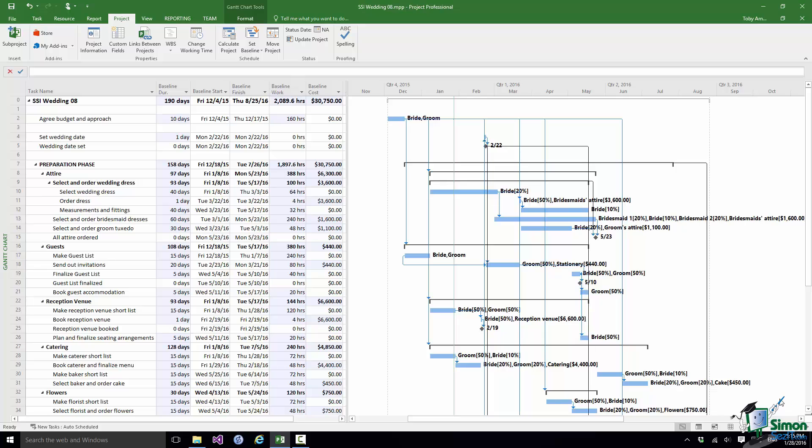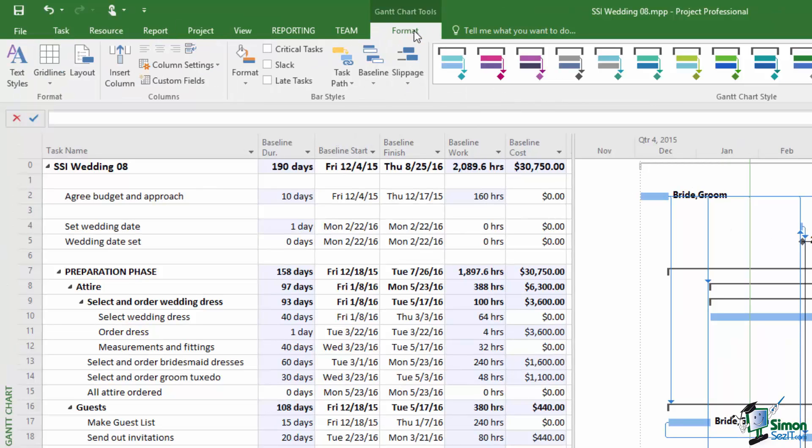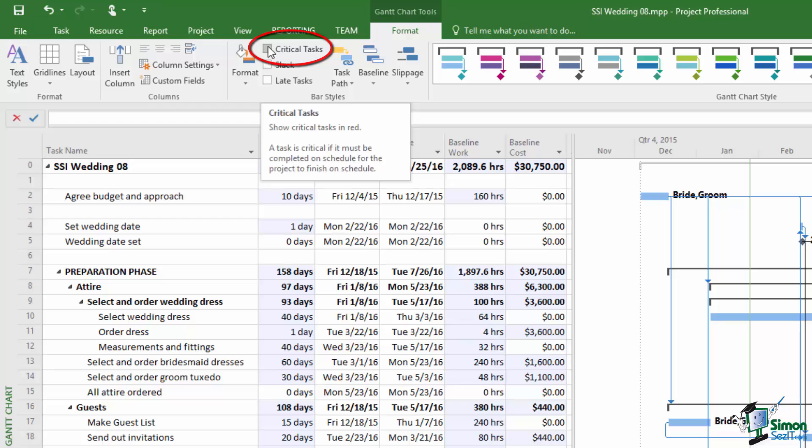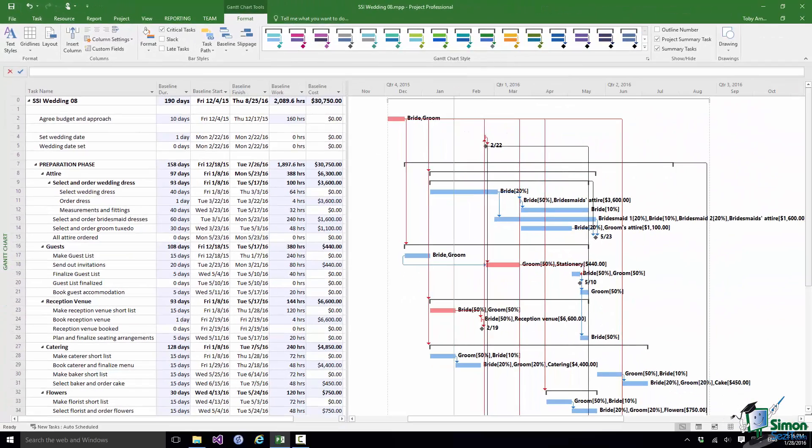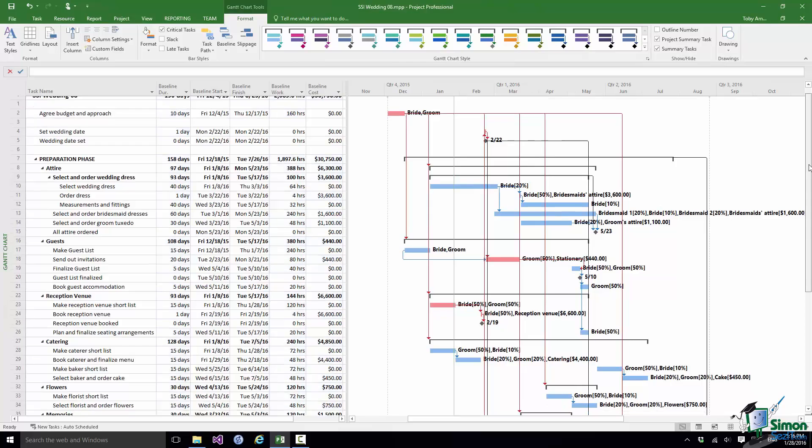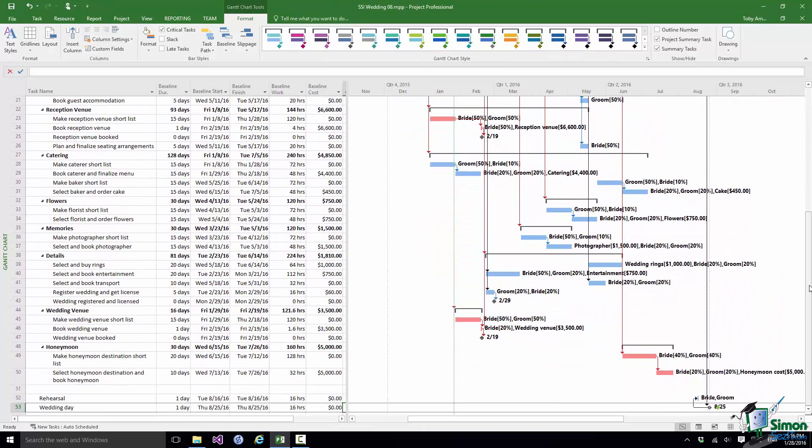So the first thing I'm going to do with the wedding project is to find out what our critical tasks are. Now in order to do that in Gantt Chart View if I go to the Format tab in the Bar Styles group one of the options there is a checkbox Critical Tasks. If I check Critical Tasks it will show all critical tasks in red. Note the screen tip description there: a task is critical if it must be completed on schedule for the project to finish on schedule. So if I check Critical Tasks you can see that the red tasks are the ones that are actually determining when this project is going to be completed.